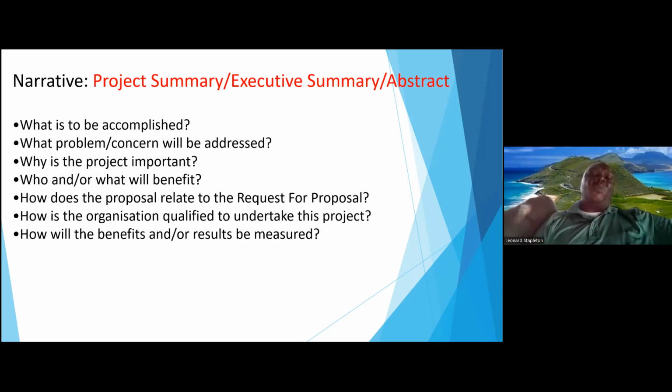For instance, you may do a workshop, and in this workshop, you're going to be training 100 people in your community how to do a backyard garden, for instance. You have to show them how you're going to measure to see whether or not that is effective. So you've got different ways. You could look and see how many persons came to see if you actually got 100.